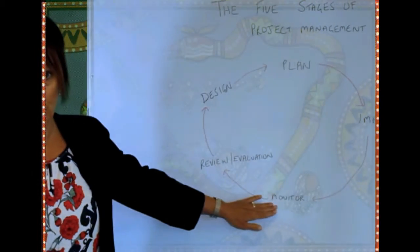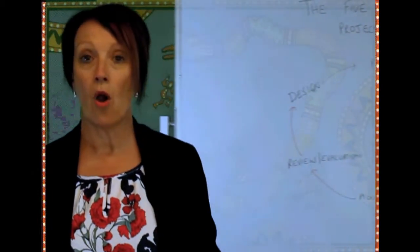We call the fourth stage monitoring, but in fact this is something that happens while you're doing implementation. It's a really important phase for you to be tracking how things are going, using some standard progress reports and reporting templates to inform your stakeholders, your funding bodies, perhaps your manager, even the people who are participating in your programs, what's being achieved according to your plan. It's a very important phase because it also enables you to catch any slippage in your project before it takes the whole project off track, so you can make corrective action before the project comes to an end.